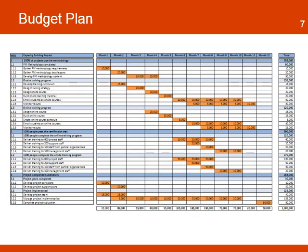A simple tool to monitor a budget is a spreadsheet that lists all the project activities and columns for each month for the duration of the project. For each activity, the spreadsheet will identify the total cost. It looks like a Gantt chart, but in this case it helps track how the project is spending its financial resources over time. This is a good tool to track the differences between what was planned and the actual cost. The project manager can easily identify any deviations and take the corrective action before it's too late.